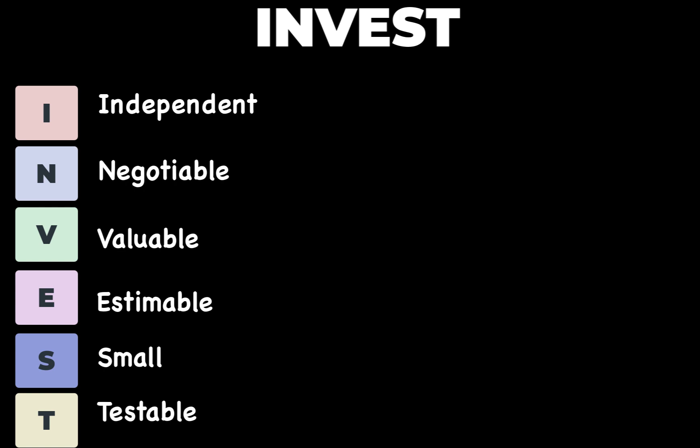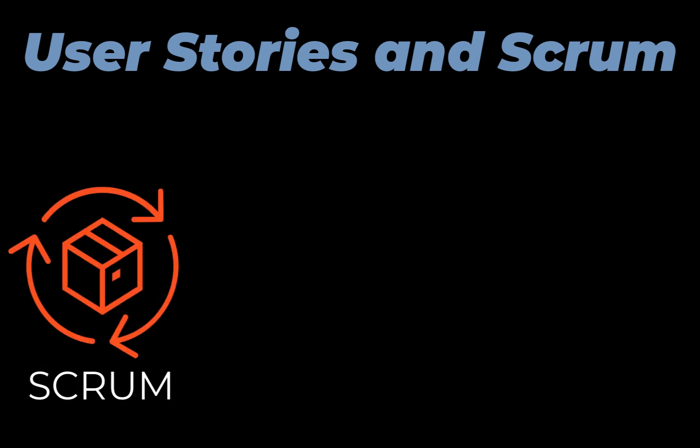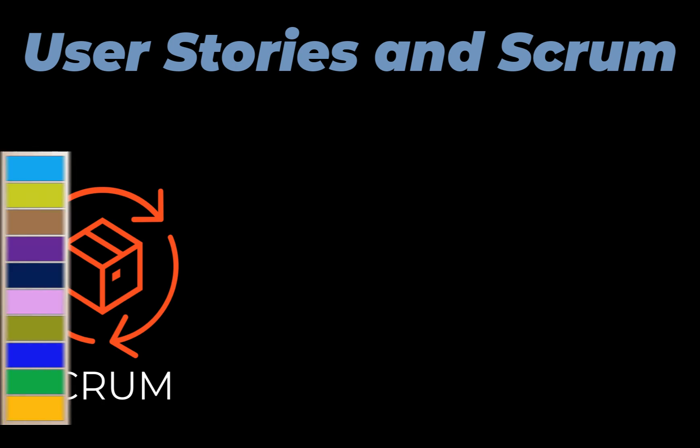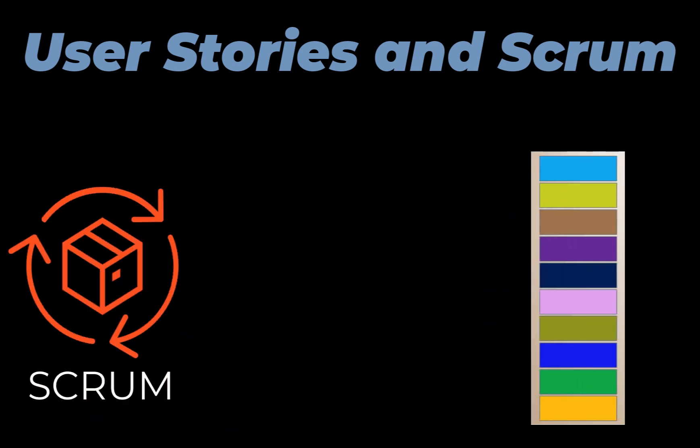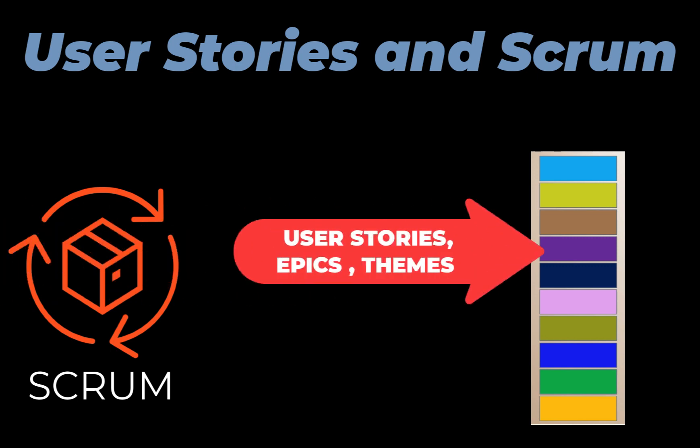Hence, INVEST helps the team to write effective user stories. Let's now move on and see how user stories fit into scrum. In scrum, user stories are molded properly. Scrum methodology uses a product backlog to keep the list of what needs to be done. This product backlog comprises of user stories, epics, and themes.